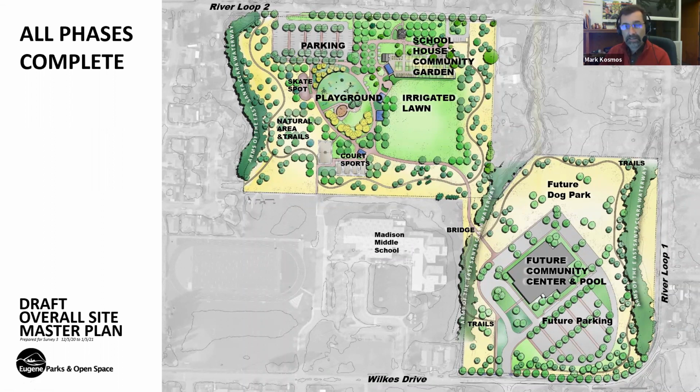Not with the park design project, but that then starts to get into a couple things. One is that road is a county road, and so currently, the way that works is there's no sidewalk on those county streets. Since we are developing the park and we are the developer, the city, us, is going to require the city, us, to go ahead and put in those improvements along our park frontage here, just the way a developer would. And that stops at the limit of our property, which is here and here.